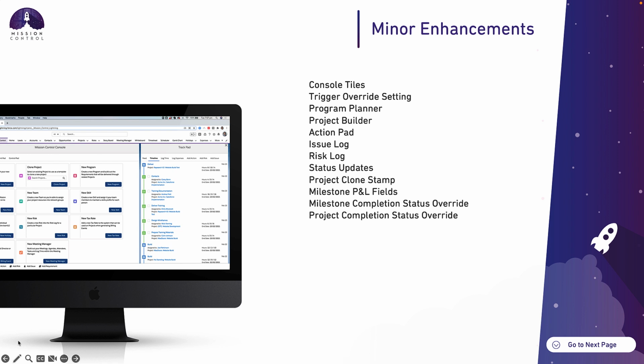We've also added some additional logic around the chatter comment rollup. The existing functionality is that when you create a post on the action or the milestone, it rolls up to the parent. So if you create a post on the action, that rolls up to the milestone, and then that rolls up to the project.